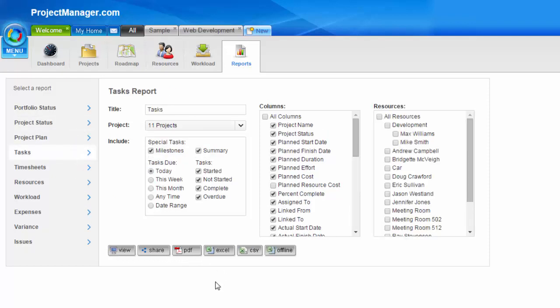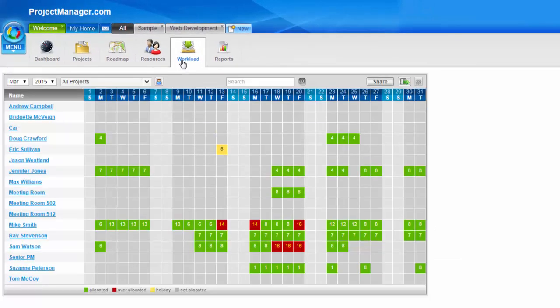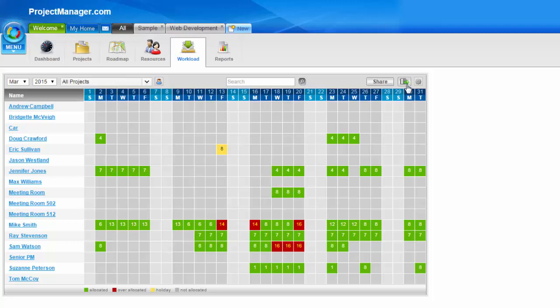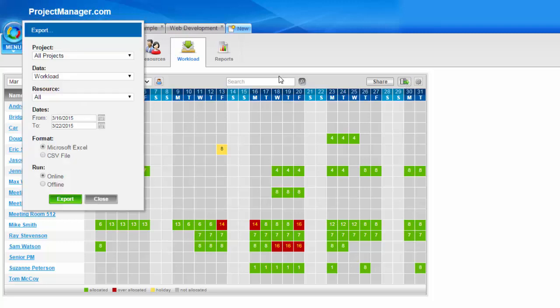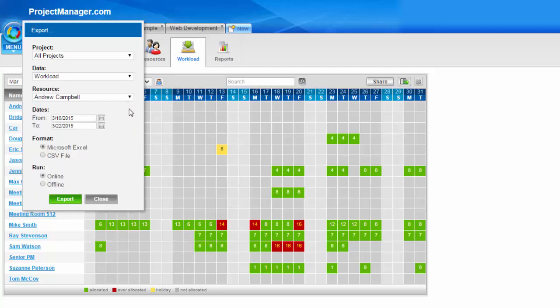Now also under the all tab, I can go to the workload grid and click on the export button on the right. And here I can choose to export all of my resources on all of my projects, their workload data, or I can cut this down. Perhaps I only want one project and I want to see one particular resource's information. I can change the date range there and the export format from Excel or CSV file.